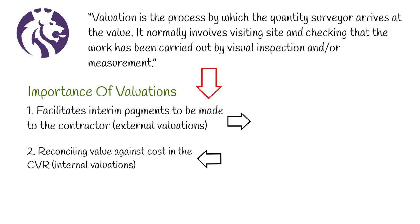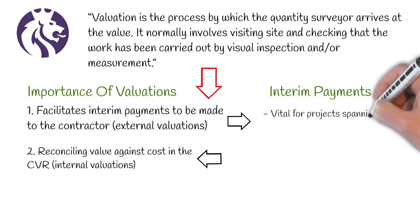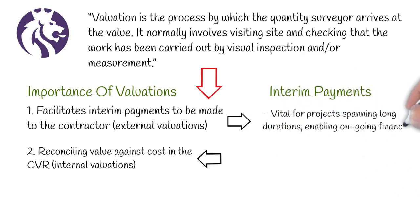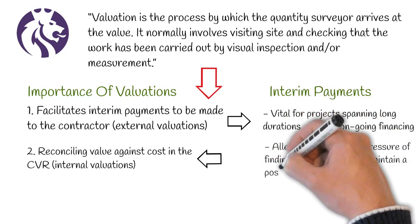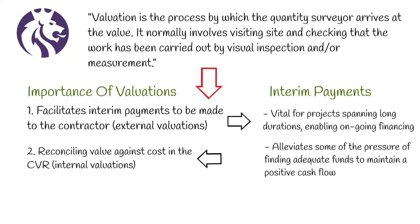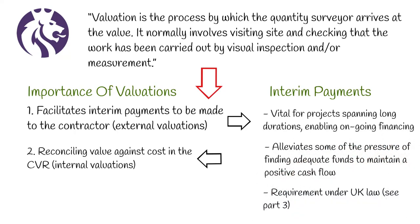External valuations are what interim payments are based on. Interim payments are vital for a construction project which spans over a long duration, as it enables ongoing financing for the contractor, alleviating some of the pressure of finding adequate funds to maintain a positive cash flow. However, interim payments are not only just a convenience for the contractor who is carrying out the works — it's also a requirement under UK law, something that we'll discuss further in part 3.